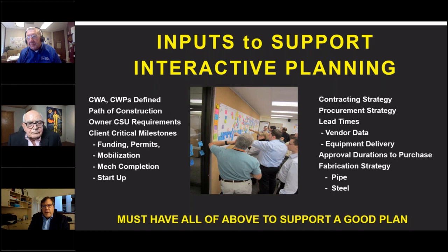Yeah. And just a quick comment, I think we have a little time here, but on the engineering perspective, I think this is where the opportunities that you said earlier, the target value design, where those conflicts that Fish was mentioning, you can look at that set-based design, you can start looking at all those alternatives to what are some choices. And if we know that those are going to be conflicting early, we can price the choices early and make good decisions before we lock in a mistake.